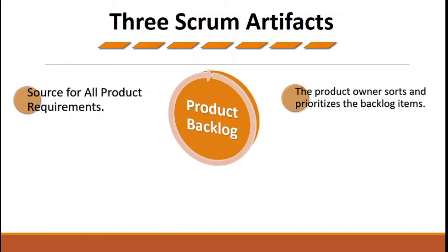So prioritization is very important in the Scrum framework, because prioritization means which items the development team is going to pick in their first sprint. So based on that prioritization, the Scrum team, which is the development team, will pick and choose to build those items. Most importantly, this prioritization is based upon the business value the requirement is carrying.